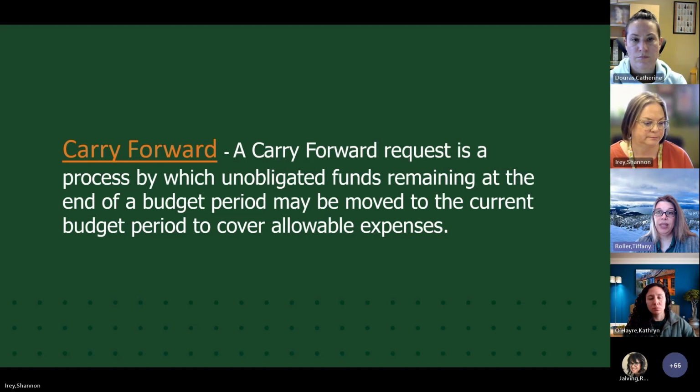We can't just assume that because, let's say, we have $5,000 left in the budget from a prior year, that we can spend it. There are some awards that might require us to even send it back to the sponsor. That's uncommon, but it's possible. So for most federal agencies, NSF, NIH, USDA, Department of Commerce, federal grants, carry forward is usually automatic, but it always does depend on the specific terms and conditions of the award. Some federal grants, it's more of an it depends. We know that going into it.